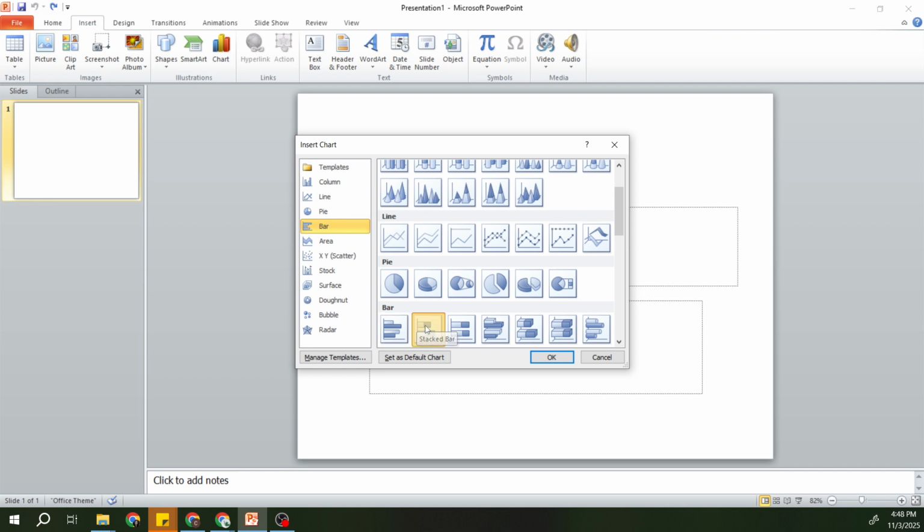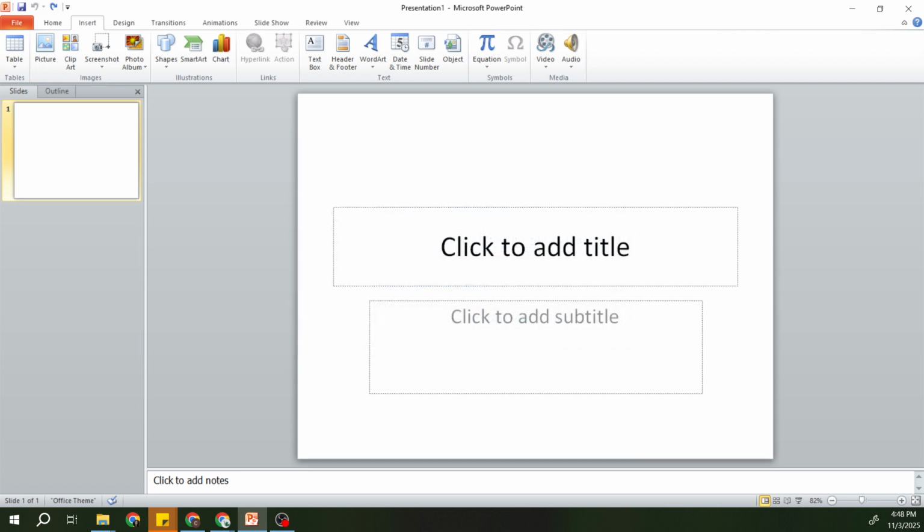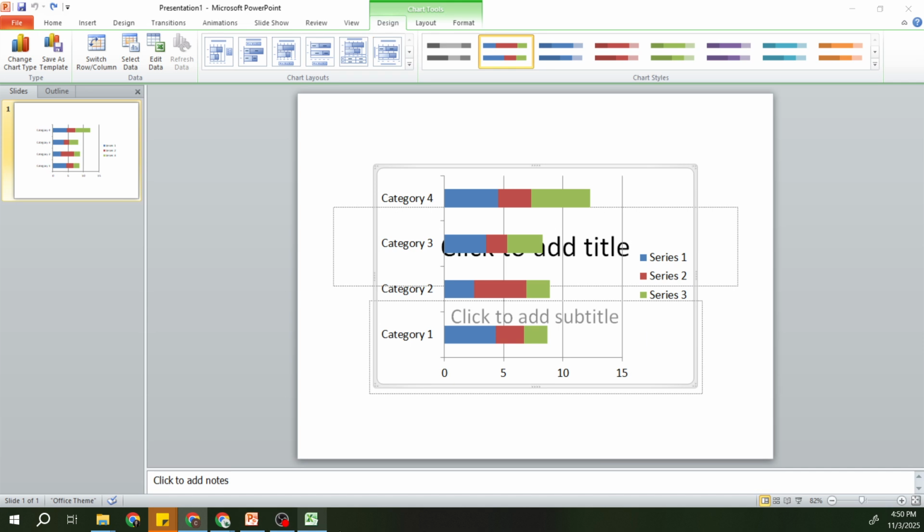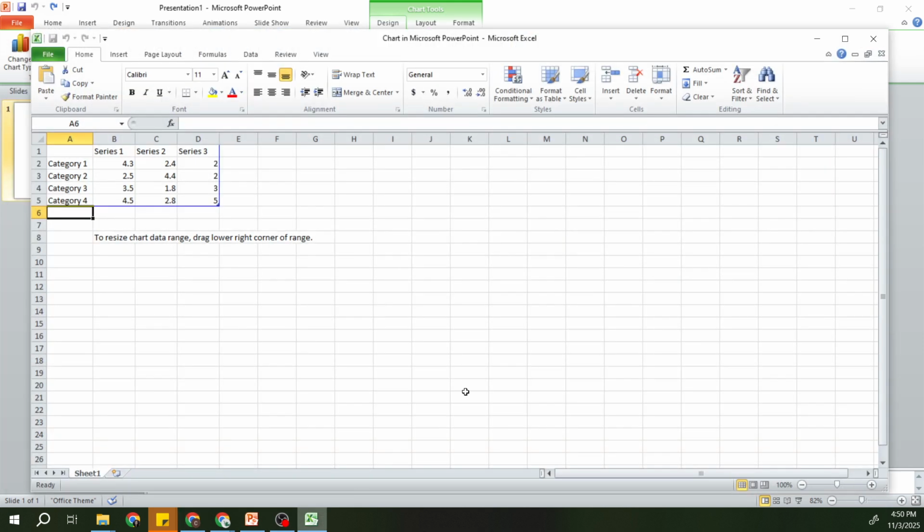When you select the chart, PowerPoint will automatically open an Excel sheet with placeholder data. This is where the magic happens. Replace the Excel placeholder data with your specific project information, making sure to include task names, their respective start dates, and how long each task is expected to take. Being precise with this data is crucial. It's what makes your Gantt chart an accurate reflection of your project.